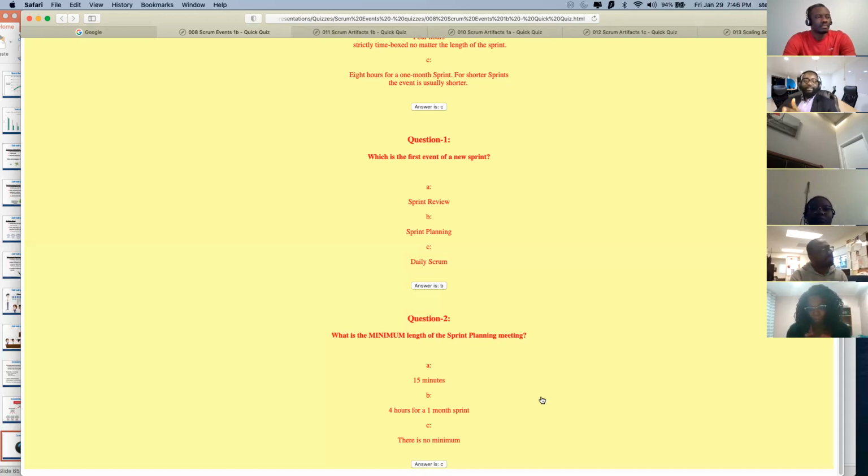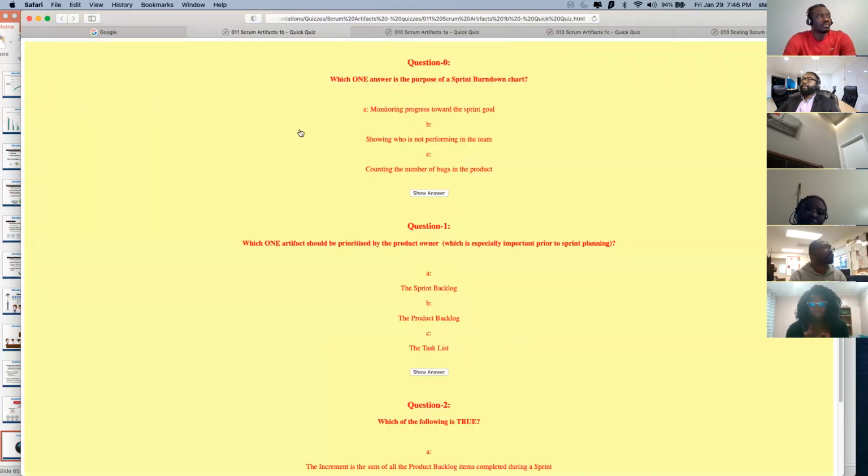We said a daily stand-up is 15 minutes maximum. It doesn't mean you can't have it done in 5 or 10 minutes, but it shouldn't go over 15. No minimum. Same thing for the retrospective, the sprint planning, the sprint reviews. Makes sense for everyone? All right, we're done with this, and we have 4 more to go, probably 12 questions.